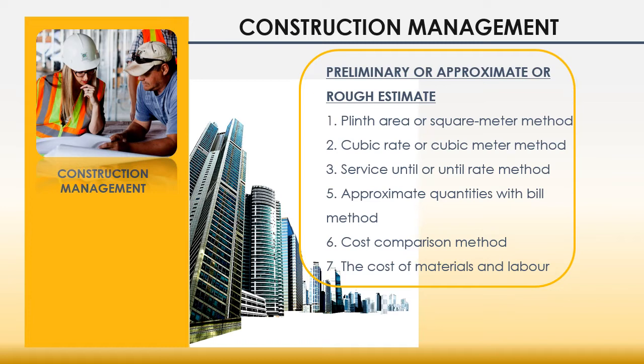Some methods of approximate estimation are the plinth area or square meter method, cubic rate or cubic meter method, service unit or unit rate method, approximate quantities with bill method, cost comparison method, and the cost of materials and labor. These are some of the methods of approximate estimate.